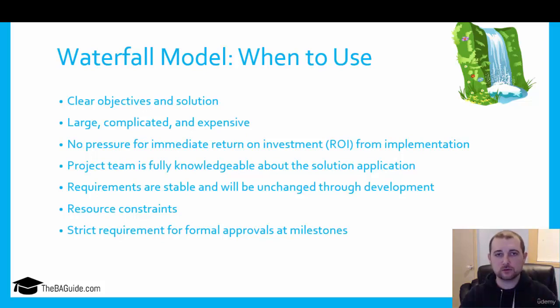After the design and you move through the development, now you only need the business analyst kind of on the outside helping answer questions, but you have the development team engaged. So again, the business is kind of off doing their own thing. You have anybody that isn't actually writing the code for the particular piece in the deployment, kind of off doing their own thing, maybe working other projects. So when you have resource constraints and you don't have people available all the time for months and months for a project, this is a good way to kind of segment that out.